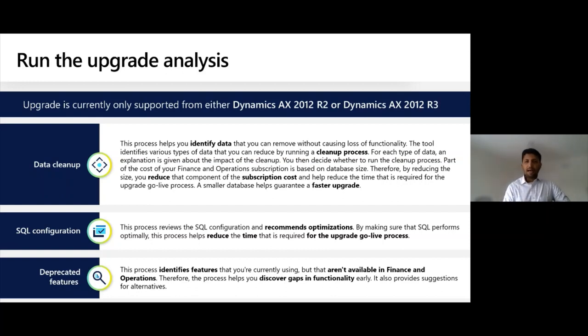The upgrade analyzer identifies the data that you can clean up in your AX 2012 environment. It will also identify the specific data which can be cleaned up without breaking any of the functionalities in your AX 2012 environment. We have a long list of items that can be cleared. This is one of the important steps while we do the data upgrade, because one of the component costs